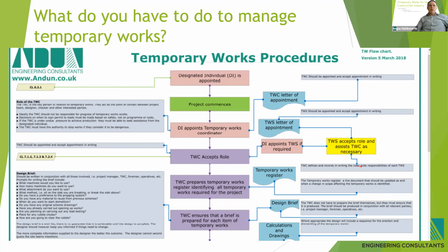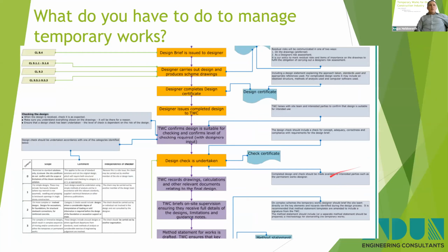Next one. So this is where we normally come in. Design brief is issued to the designer. Now, writing a good design brief is an art. It needs to be detailed enough and it needs to have the information required for the designer, but it doesn't want to be too detailed in that you've told them exactly the solution you want, unless, of course, that's the way you like working. But generally, it should be, this is the problem, this is all the constraints, this is the information we have regarding the problem or the site. Can you give us a design that satisfies the brief? That makes it more interesting for a designer, certainly.